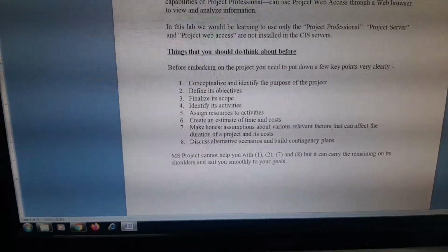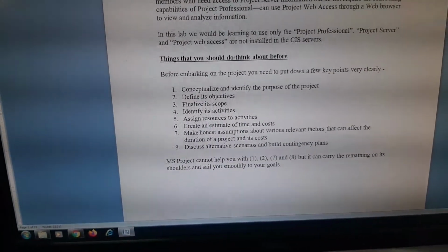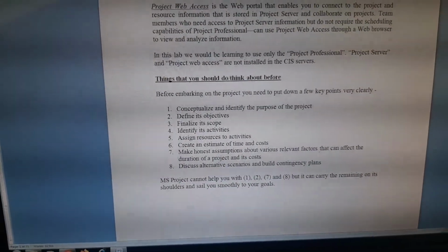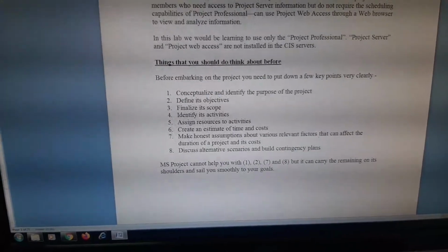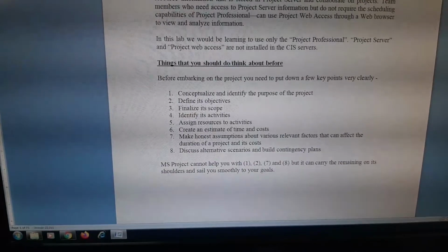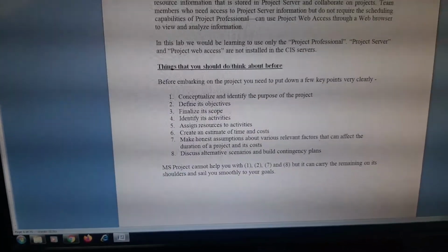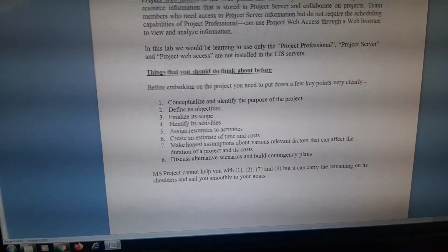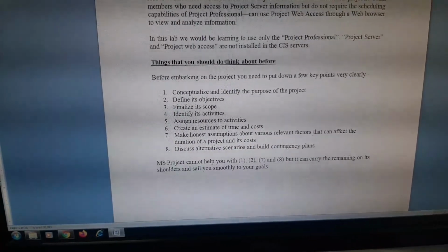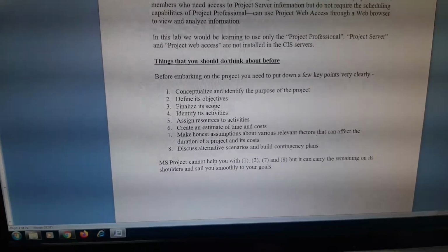So in this MSP, you need to have costing as well as time scheduling. Usually entrepreneur companies do a cost to complete of the project, and before starting the project itself they prepare a cost to complete, and they have their own schedule also. That schedule we call the baseline schedule. Please remember this: the first initial schedule which we create is your baseline schedule.